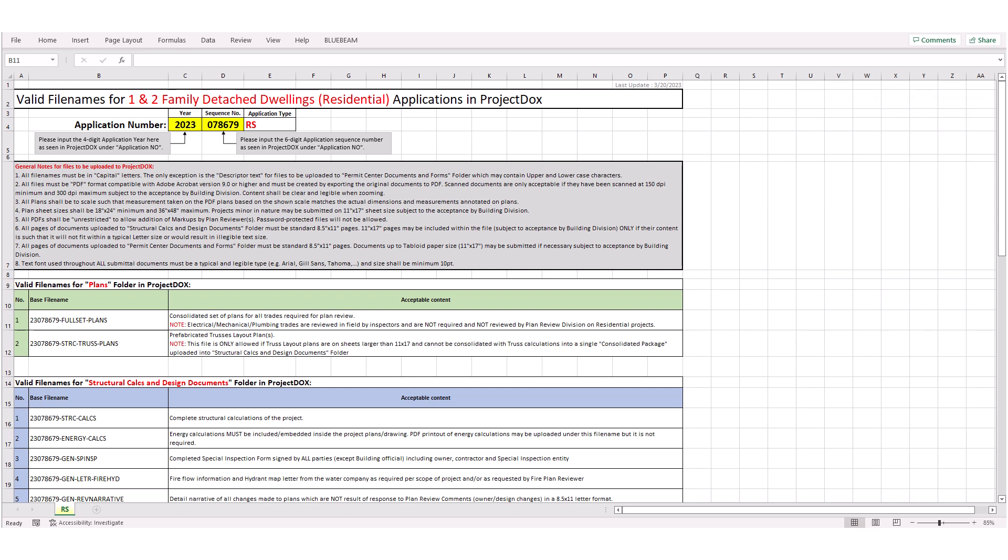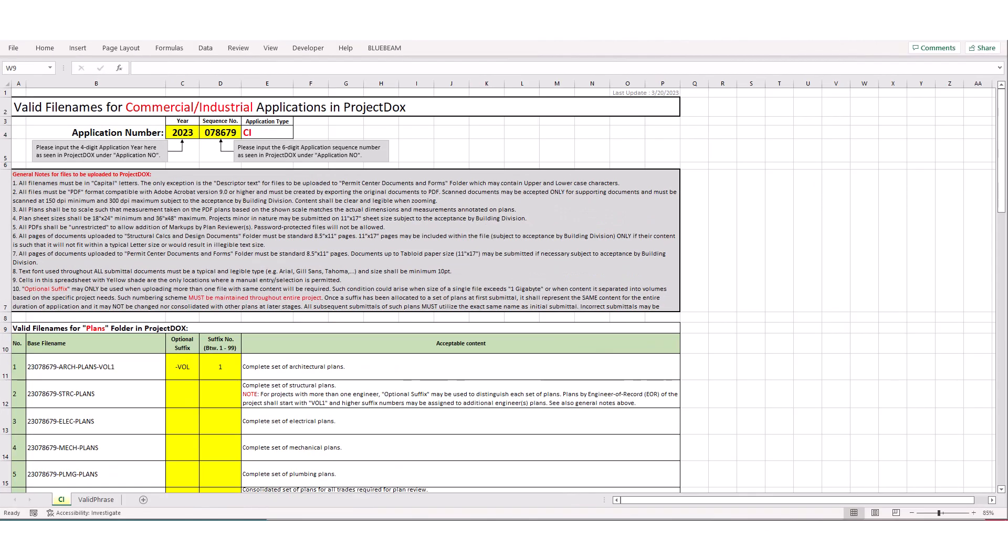Please note, the Excel file contains all possible acceptable filenames that may be required for an application type. However the scope of your project may not trigger use of all these filenames. For example, if your project does not utilize prefabricated trusses, then no files related to trusses would be required. Please also note, each Excel file is tailored to the application type in which it has been provided. For example if your application is for a commercial or industrial project, Excel file would be different, as seen here.